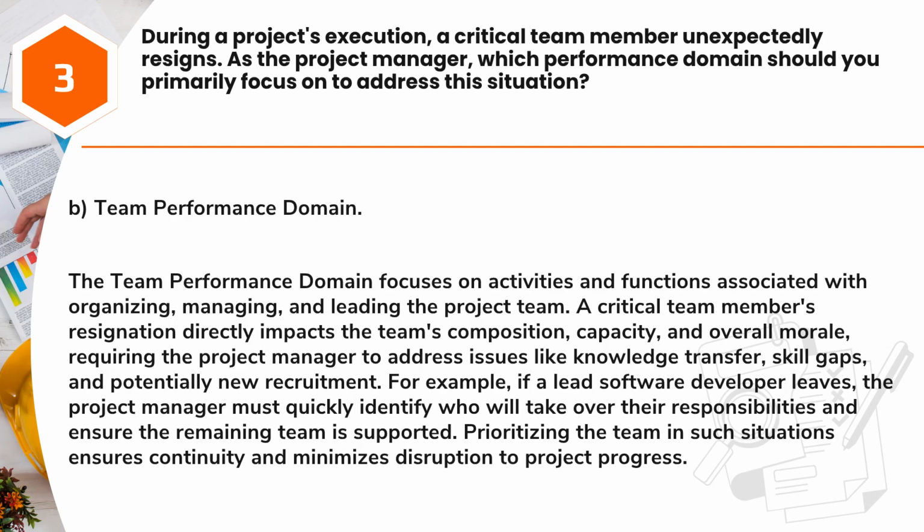Answer: B. Team performance domain. The team performance domain focuses on activities and functions associated with organizing, managing, and leading the project team. A critical team member's resignation directly impacts the team's composition, capacity, and overall morale, requiring the project manager to address issues like knowledge transfer, skill gaps, and potentially new recruitment.